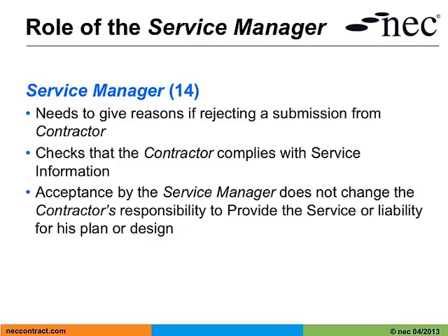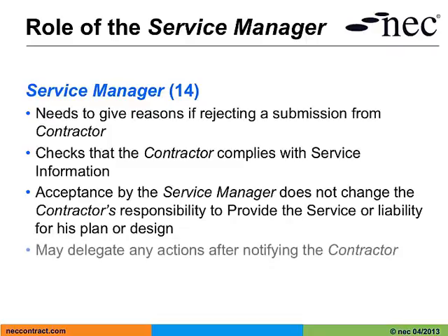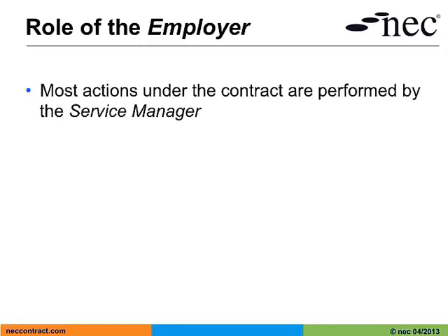The contractor gives the service manager the authority to delegate any actions once he has notified the contractor. On large or complex term service contracts, it may be necessary for a number of the employer's staff to interact with the contractor. The delegation provisions can allow this to happen in accordance with the contract. Most of the actions under the contract are performed on behalf of the employer by the service manager.